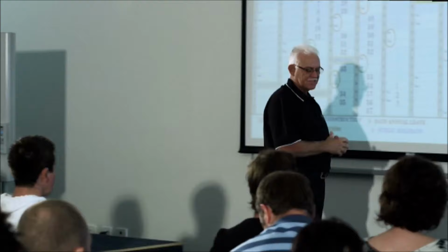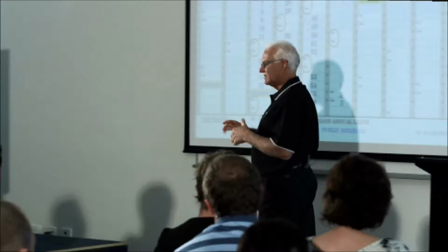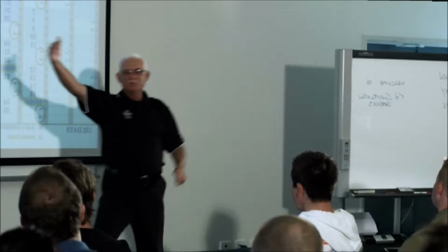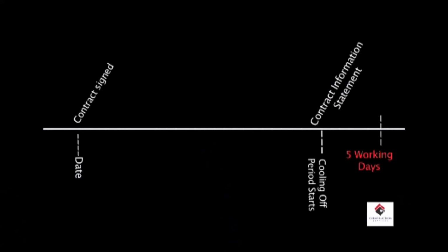Yep. Question is the cooling off period. If you've signed a contract and you haven't given them the contract information statement for 10 days after they've signed the contract, the cooling off period starts 10 days when you give them both. Right? If you've given them the contract back there and you've given them the contract information statement there, that's when the cooling off period starts. 5 working days. If you sign a contract on a Saturday and you give them the contract and you give them the contract information statement, the cooling off period starts on Monday.